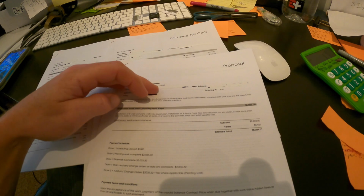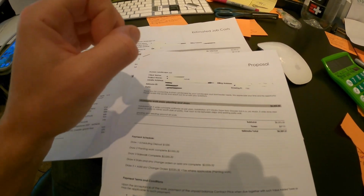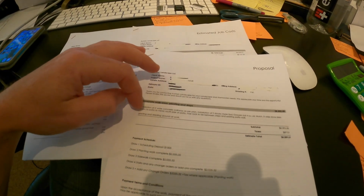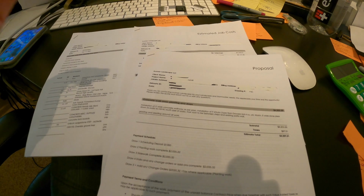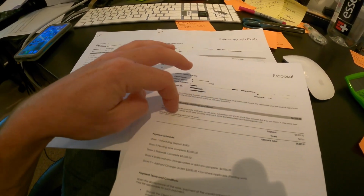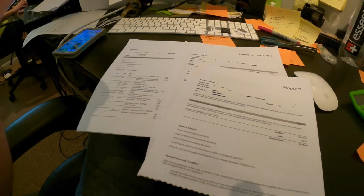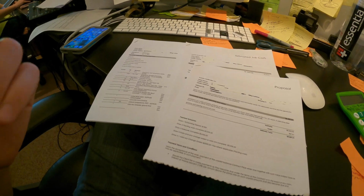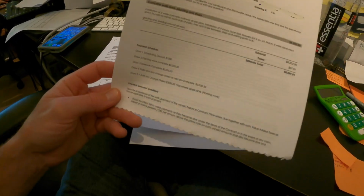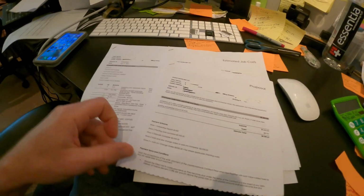Basic thing, and then it says walkway as per plan. Ideally, that should say approximately as per plan. That way you get some leeway, or you put a plus or minus: installation of 3 foot wide plus or minus walkway, which is a little too specific there. Actually, it should be that specific. I'm just talking in general, if it's 9 cubic yards, say approximately 9 cubic yards, or 9 cubic yards plus or minus. Things like that give you a little bit of leeway for estimating purposes.